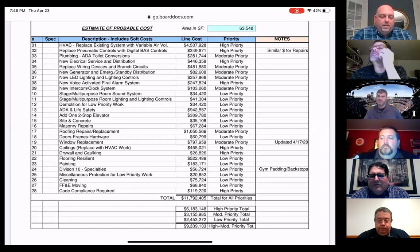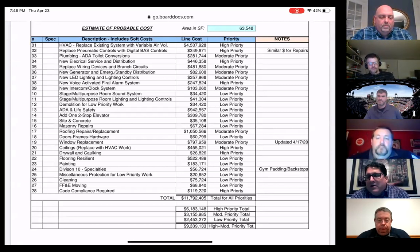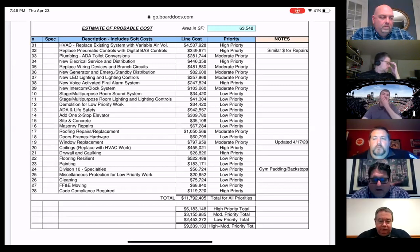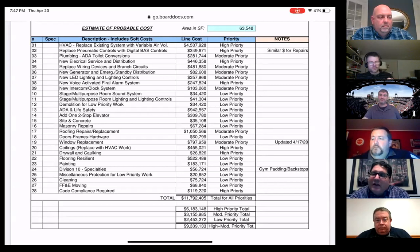But I think that very quickly you would want to put 10% or so on your hard costs and your soft costs. So you're going to add another $3 million to your 30 million, and you're going to add, what was soft cost? Maybe 6. You're going to add 6 to that. So you're going to add $4 million to your what was probably an all-in of 34, I think. 34, something like that. So you're going to be more than 35 and less than 40. I don't know, call it 37, 38 million. All right. Do it for less.